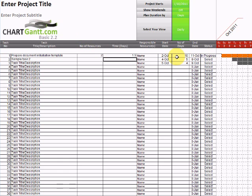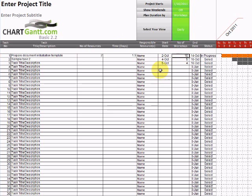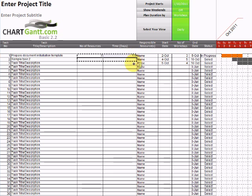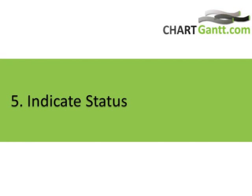And let's say there are two resources and we're spending 1.5 days each. And we want to recalculate this number of days. We might actually want to run it in workdays because we want it to represent 3 workdays by that. And there we go. We've built a calculation and we could just continue those down. Drag them down if we wanted to reset our formulas. So very easy to run independent calculations within ChartGantt.